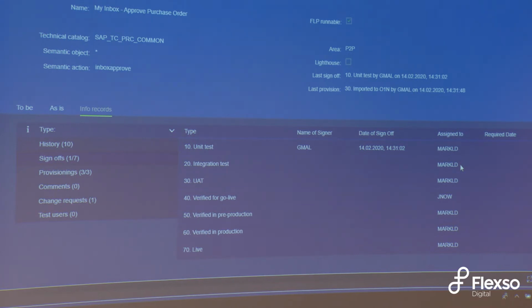This is another practical topic during the project. The app was already tested, but then in the end, you've made some changes to it. And then everybody forgets, okay, it's a new change in the system. You have to go through at least start it once, at least test it, check it, and so on. And someone also is responsible for that. So tracking this will be invalidated, and then the test has to be done again. This helps everyone, not only UI5 developers, because in the end, there is a basis team which needs to import this, and then they also will ask for the proof, okay, is this ready for go live?